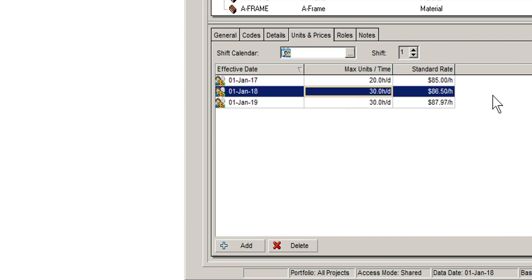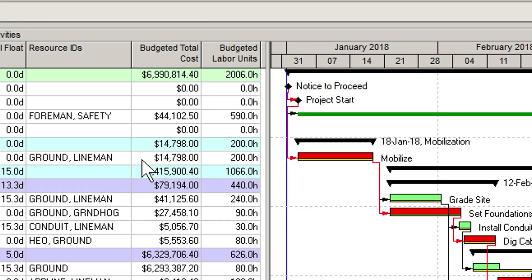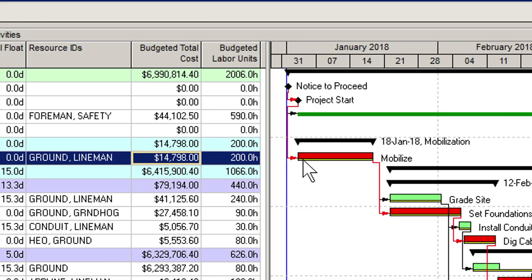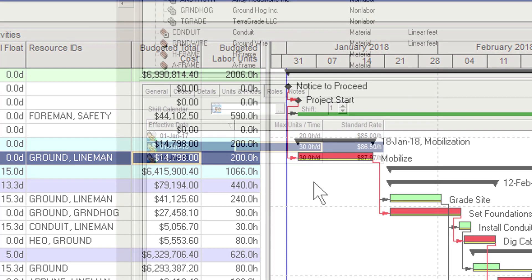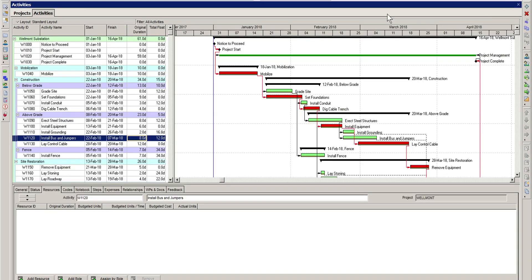P6 takes the hourly rate and multiplies it by the number of hours a resource is assigned to an activity. That way, P6 can calculate an estimated cost for completing a particular piece of work in the project. Now, let's take a look at the basics of making a resource assignment in Primavera P6.